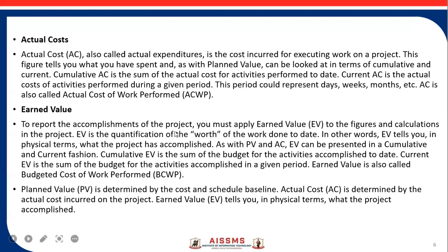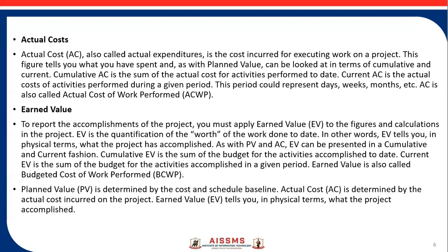To report the accomplishment of the project, you must apply earned value to the figures and calculations in the project. EV is the quantification of the work done today. In other words, EV tells you in physical terms what the project has accomplished. As with planned value and actual value, EV can be represented in cumulative and current fashion. Cumulative EV is the sum of budget for activities accomplished to date. Current EV is the sum of budget for activities accomplished in a given period. Earned value is also called the budgeted cost of work performed. Planned value is determined by the cost and schedule baseline; actual cost is determined by actual cost incurred on the project; whereas earned value tells you in physical terms what the project has accomplished.